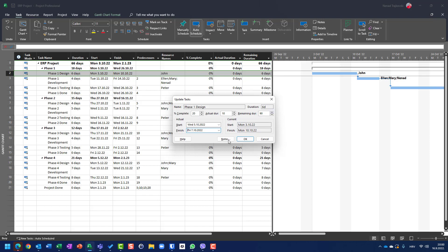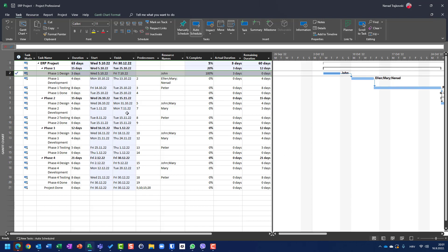First of all, Microsoft Project calculates total duration from the two dates: Friday 7th of October minus Wednesday 5th of October, taking into consideration any weekends or non-working days. In this simple example, the result is two days. So the actual start is 5th of October, actual finish is 7th of October, and total duration is three days, with percentage complete at 100%.